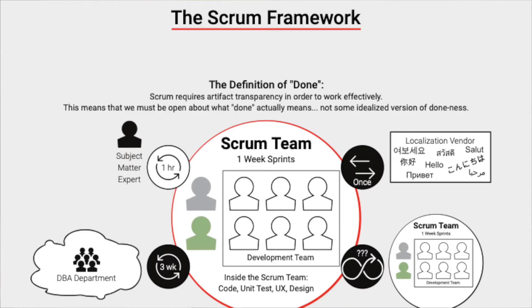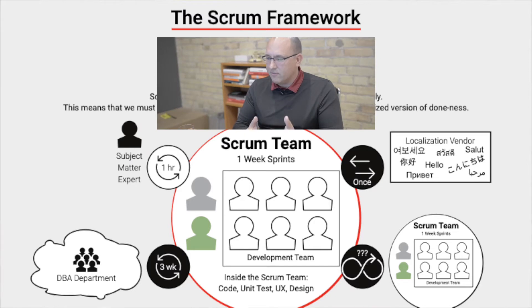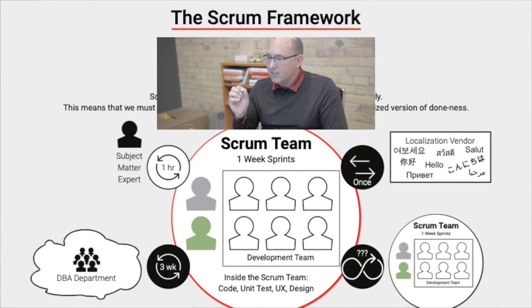Many organizations doing Scrum have multiple Scrum teams working on the same system or product, and there are dependencies between them. A very common one is between different components or layers in a software product. Your Scrum team might be doing one-week sprints on the front end, then submit a request to a back-end Scrum team to get some work done. That request goes onto a product backlog, and there's no service level agreement or commitment for that other team to complete the work within a specific amount of time.